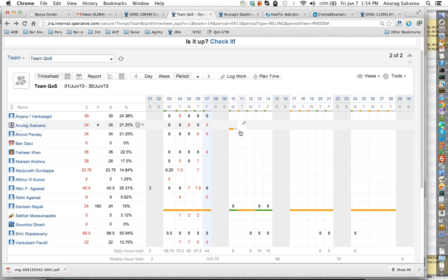That way, you'll be able to foresee any problems. As an iteration manager, as an agile coach, or scrum master of my team, I would like to see which stories are at risk every day. So if there's any risk of not being able to finish a story, I would be able to see it very quickly. If there is a slippage, if the team members are not able to work against what they had planned for this iteration, that is a risk right there.